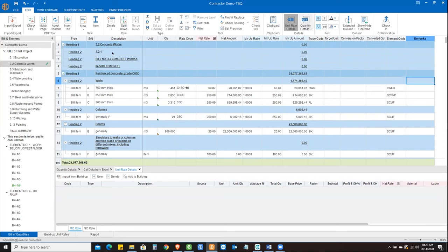You can name them. And this is quite useful for multiple quantity columns, BQ. Some standard forms are there, obviously. That format is quite useful if you want to use multiple quantity columns, and then like tower A, tower B, tower C, like that. And then you can have another BQ format like for terrace housing, or for instance, lump sum BQ. All these different formats are available in the software. So we can get or build up all these different formats in the software as well.